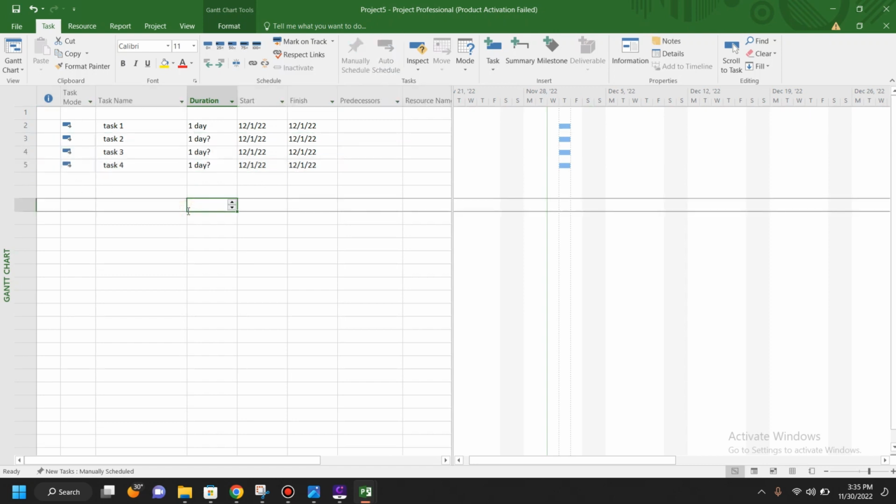Okay, so why are we transforming the manual schedule to auto schedule each and every time? To confront that part, what we need to do is put one setting around here so that the new task will automatically be entered as auto schedule. That is a very important part.